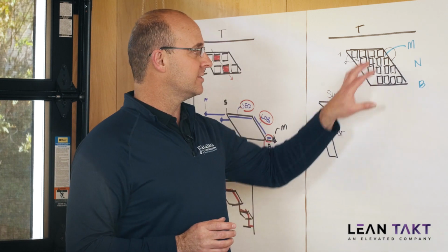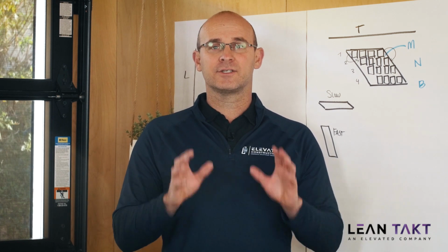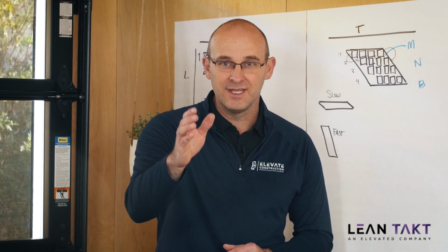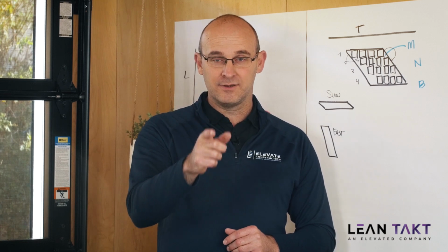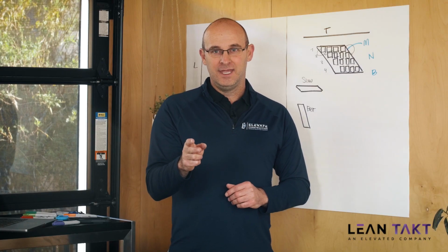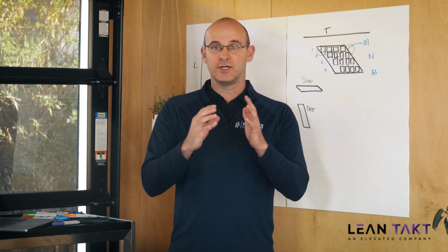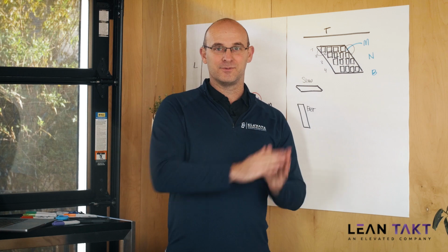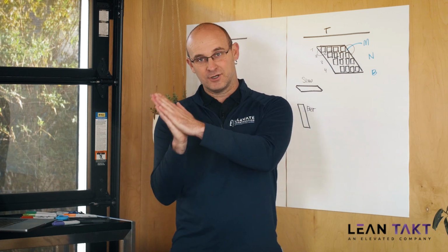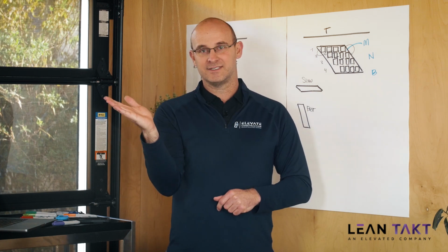So the calculation says, all right, you have 4 wagons, you have 4 zones, this is the work that you're doing, the smallest time unit is 1 day. How fast could you possibly go? And it will tell you how many zones you would have to go that fast, 100% speed, at what takt time. So if you have a 100% realized flow potential, that means you're going the fastest you can go. If you're not doing anything, that's 0% realized flow potential. If you're going your fastest, that's 100%. That's like the speedometer on a car, slowest speed, fastest speed.